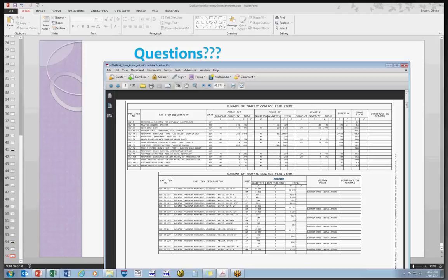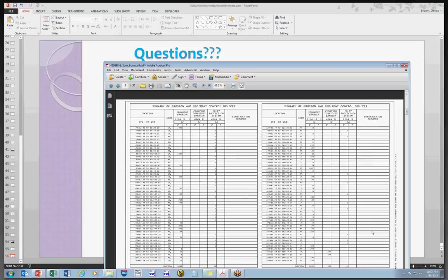If you've got a situation like this one, where there's an extra column which makes the last one longer, they can take phase 3 and put it up with phases 1 and 2, have 4 and 5, and then have room for your design notes down here. To put in this information, it's based on a certain number of applications or lifts, and any other design note information can be put in.